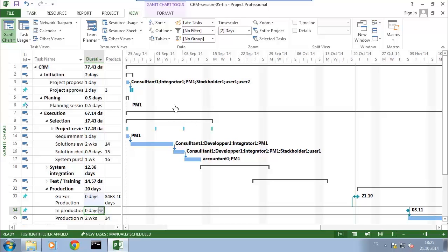So before going ahead, let's get back to where we were. I'm back here to the CRM project, which has a first set of tasks for initiation, a second set for planning, and then the execution phase where we do the real work — selection, system integration, test and training — and once all that is done, we go to production.